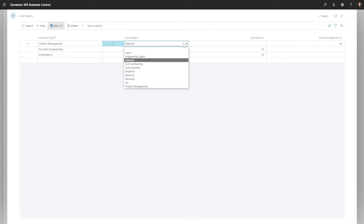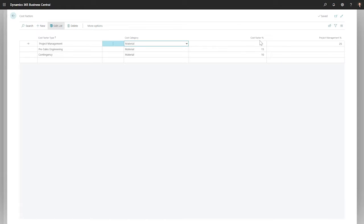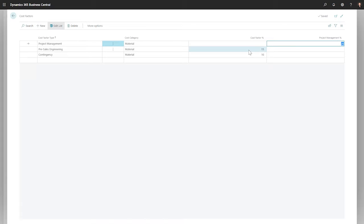Jobs are going to have different cost-categories with different levels of variability. This example tells BC that when I add material, I'm also going to need 25% of that value for project management time. A matrix is being built to calculate those extra costs that attack the bottom line.